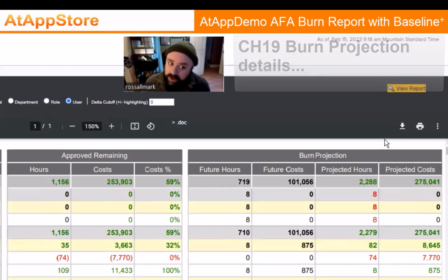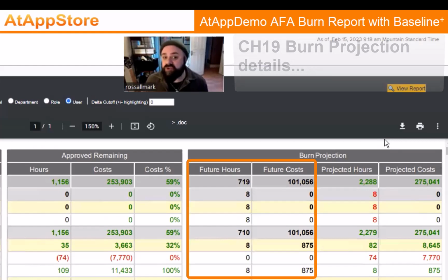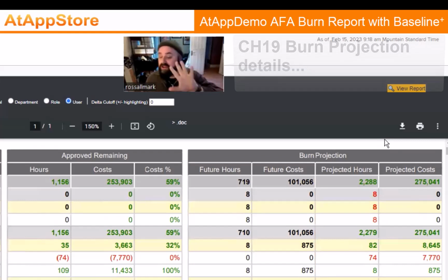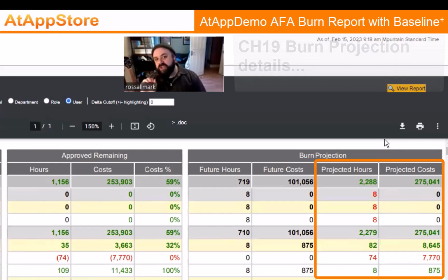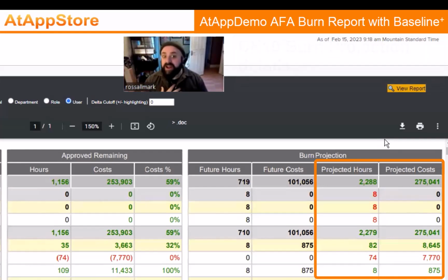But what we're going to want to do is then match that to the future hours from the plan. So on one hand, you've got a pretty validated and robust idea of the past, and you're marrying that to a projection of the future, which the project owner is very invested in being correct because that is the hours that are on our resource plan. So if they've booked 100 creative hours into the future, they're actually going to need that.